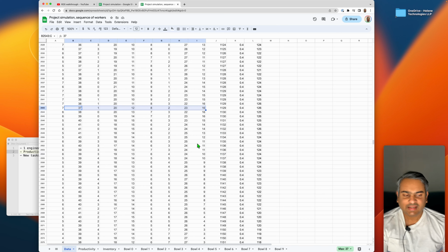So if you look at these highlighted cells, these are all partially assembled cars. The first row is backlog, nothing has been done on it. Backlog doesn't incur a cost, but these things in blue incur a cost because to get something to these columns required a lot of time from engineers. And there is no result because you have partially assembled the car and you can't sell it. This is good.